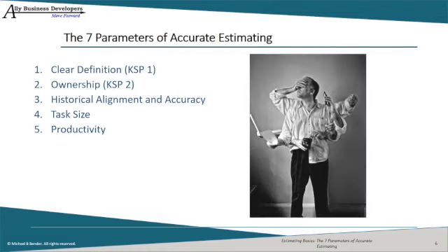Productivity is our next parameter. We covered this topic in our first micro lesson on estimating basics. We live in a multitasking society. However, the more people multitask and the greater the number of concurrent activities they're responsible for, the less reliable their estimate for this task will be.